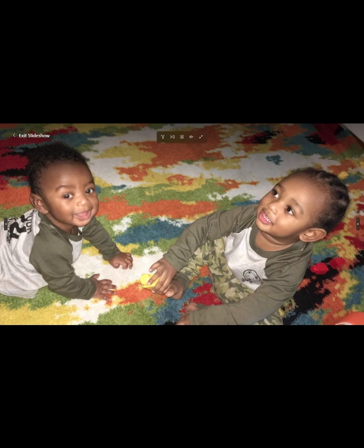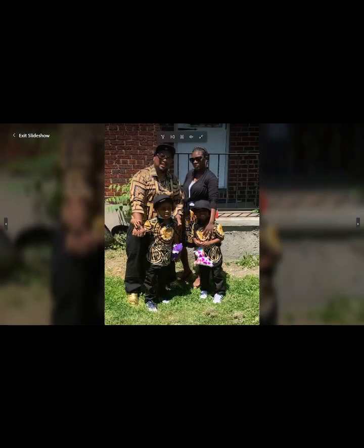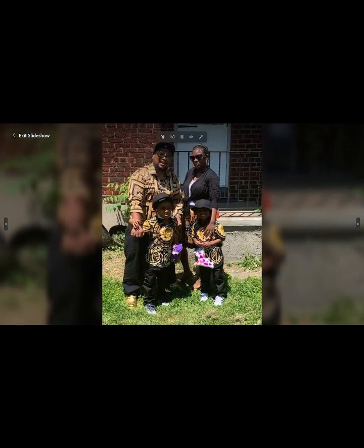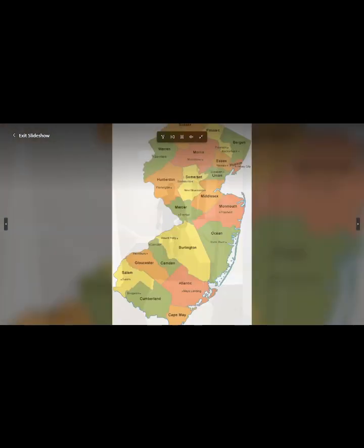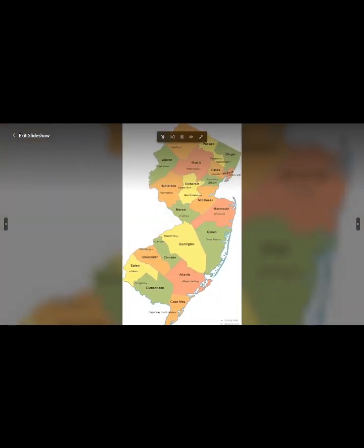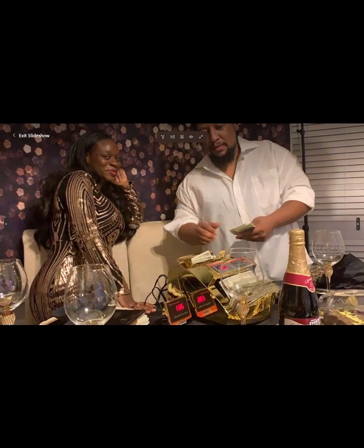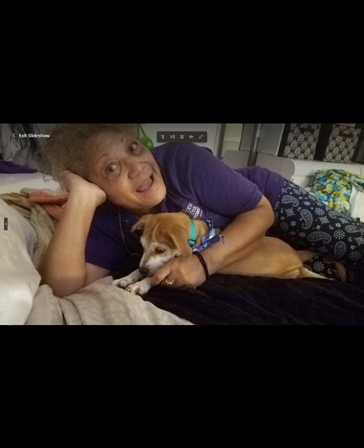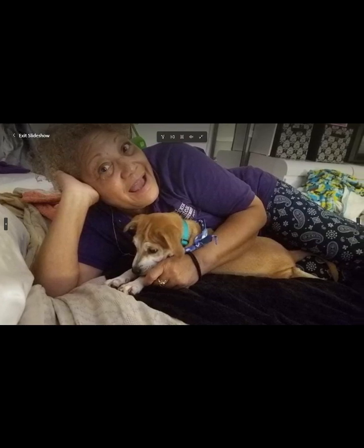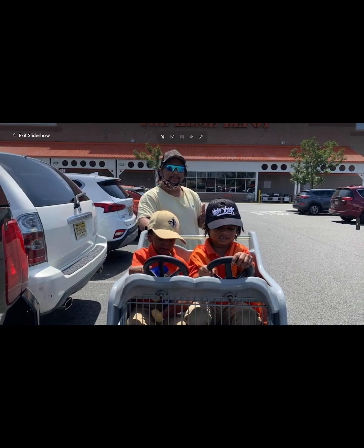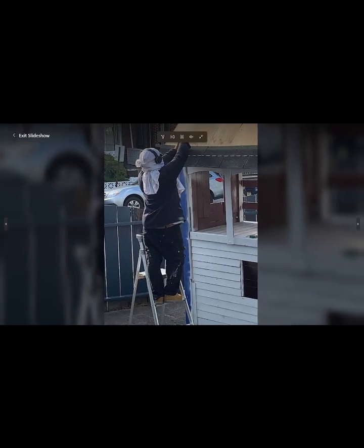Substantial performance. With the work under contract nearly completed, a substantial performance discharge of the contract may be in order. Under these circumstances, one party may force payment from the other party. Say, for example, a contract to build an addition onto your house, and the builder finishes 95% of the work, but you still owe him a third of the agreed upon amount for the project and refuse to pay until the last 5% of the work is complete. The builder can sue you for payment on the basis of substantial performance, and the courts may let you keep a small amount of the money, not the 33% you're holding, to finish the job. The builder receives most of the payment and is obligated to you or declared over.